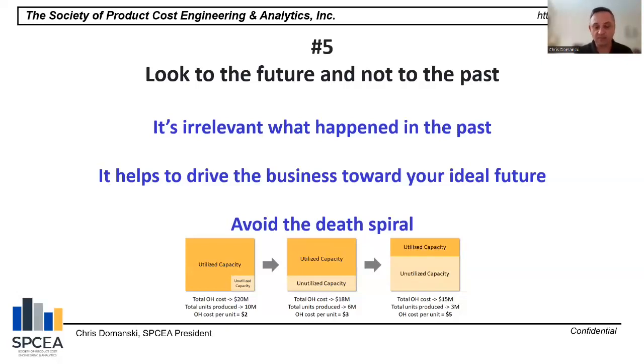And they keep using that new cost structure, this new P&L, with that big business missing and capacity utilization heavily reduced, to quote new business that's 2-3 years out, and they keep losing business because they're not competitive, and that just keeps happening. It gets worse and worse every year as they lose more and more business. The company usually goes out of business, and they don't even know why. So I would highly recommend that you look to the future instead of focusing on the past.